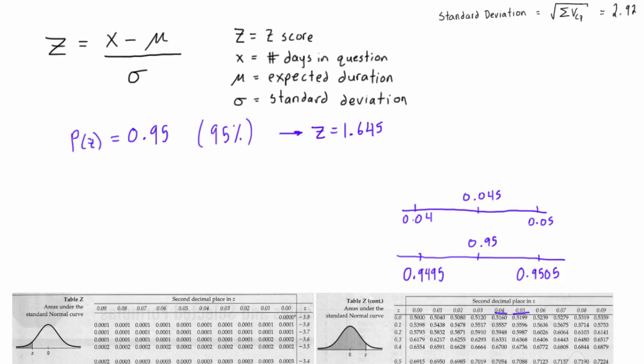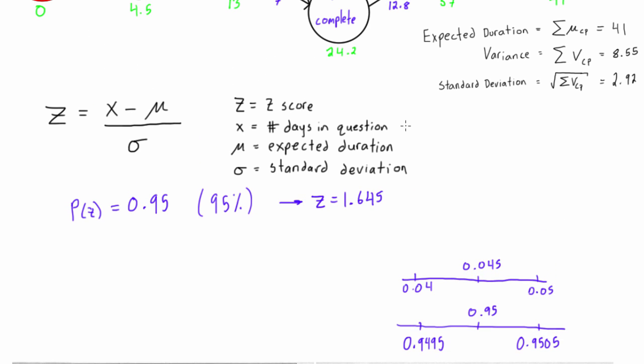All right, so now we have the z-score. Now what we're looking for is the project completion date with a 95% confidence level. We do know the expected duration is 41 and the project standard deviation is 2.92.